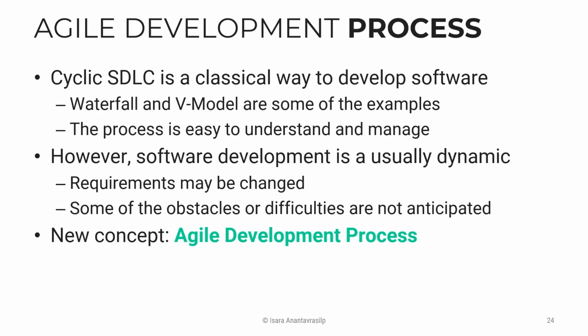Such processes do not cope well with changes, but they got some good things too. They are easy to understand and easy to manage. Easy to tell your customer when we should start which step, when each step should end. They are also suitable for projects where requirements are well understood, such as tax calculation or software for aircraft or spacecraft, or small projects, something like one or two months development time. With these small projects, the set of requirements is small and the development time is quick, so you don't have much time for the change to occur anyway.